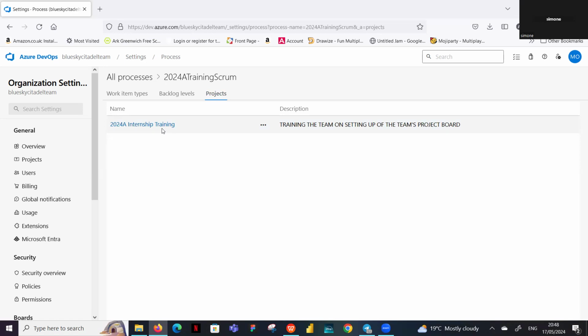Okay. All right. So if there are no questions, let's just go to the next thing, which is, oh, sorry, I have a question. I'm so sorry. Okay. So doing that, it won't affect what everyone else can see. That's just for you. Yeah, now that we've created an inherited process, anything we do on our project board now is not going to affect any other project that you see on the main Scrum process, because we've taken ours away from it.